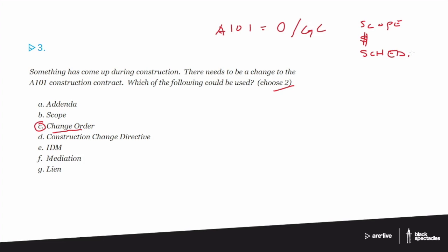So then the dollar amount change would be 0, but the schedule would be altered by whatever amount of time, 2 weeks or whatever it would take to get that worked out. So the idea is that if those 3 things are part of the essence of the contract, then everything that changes the contract should be clear about how they change those 3 issues.